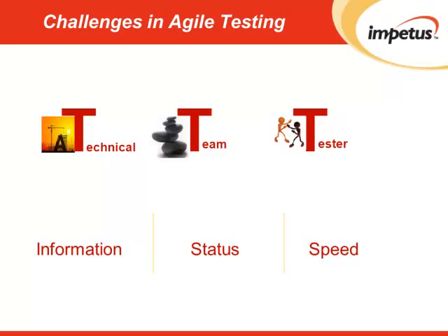Let me go ahead and share an example. Our team was testing an application and verifying the access control functionality. After spending considerable effort on a particular module, the team was told that that particular requirement had become obsolete. Now, just imagine the team's frustration and consternation when they realized that they had wasted hours and considerable effort in testing and filing defects for an obsolete requirement. This wasted time could have been easily avoided if an update was made and reflected in the user stories.